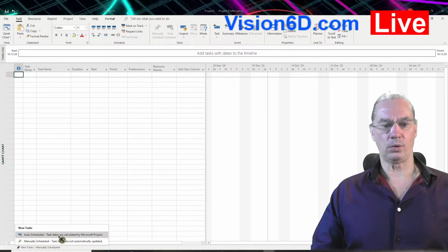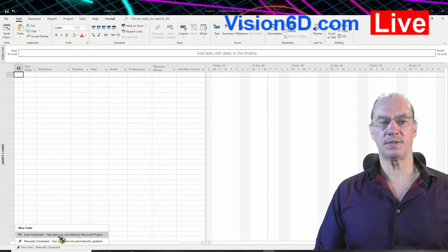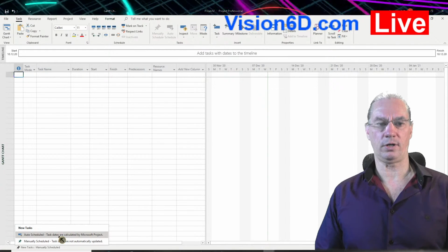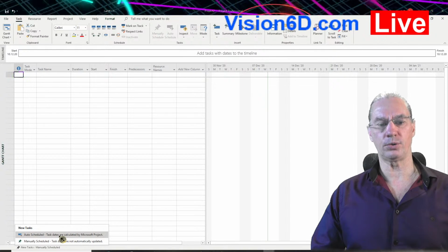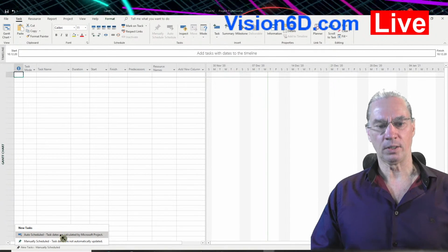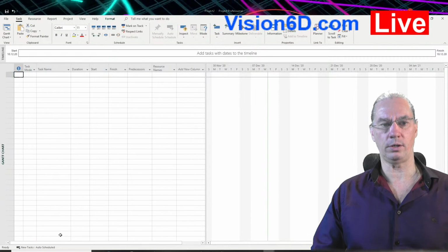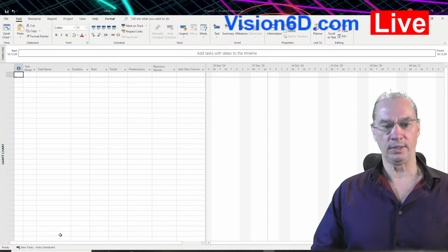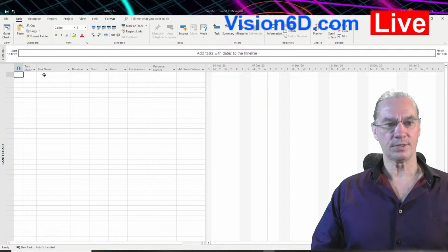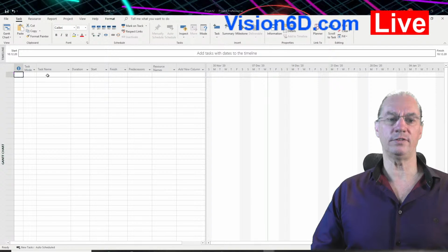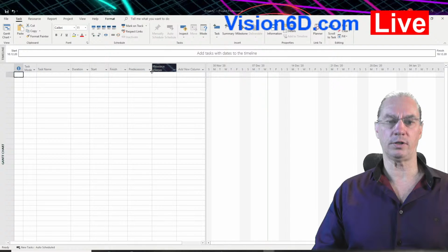Yes. So auto schedule will help me in setting the chronology of tasks. It's way easier to work in auto schedule mode. So I will say here tasks are defined with the auto schedule mode. This is also something I could change in the options. So here you see I will define a task, and after the duration, start dates, and so on.